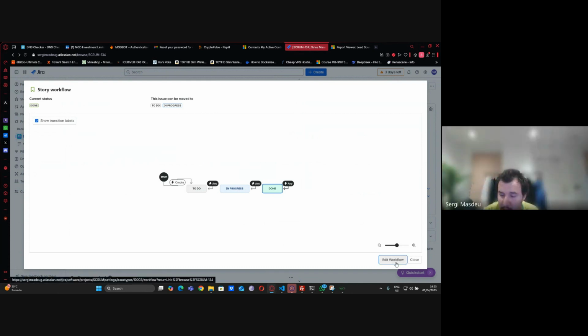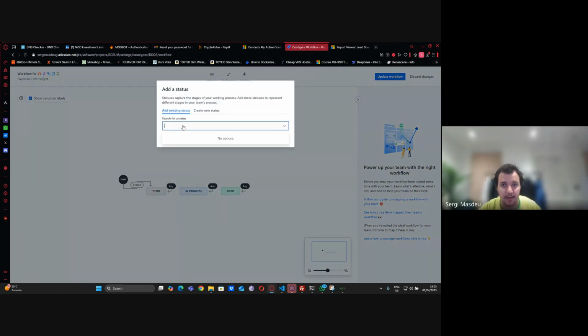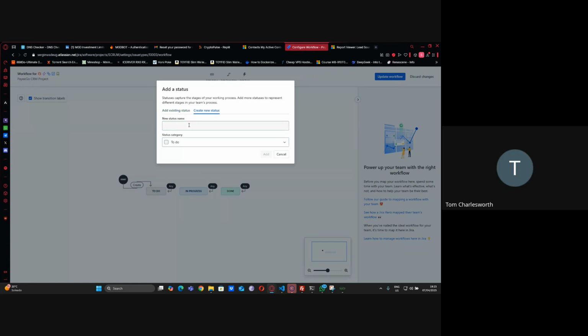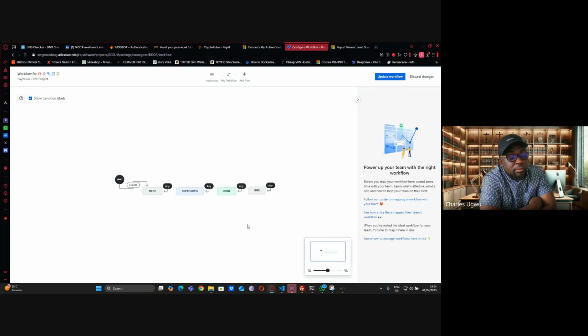Okay, I'm checking if I can create a workflow called bug, so we can then set inside of it. I would say that if you are creating that workflow for the bug, then if you nominate that area to be a bug, it should go back into the product backlog for consideration. Yeah, you should capture the bug in Jira. You should add it as a product backlog item, but within the product backlog, you capture it as a bug.